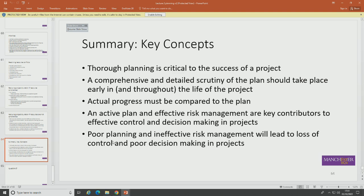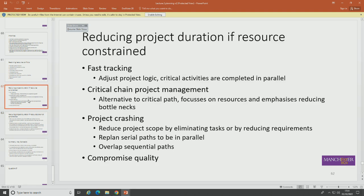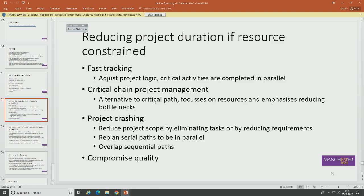So the critical chain is part of the slides at the end, which is here. What I did there was just explain that in a bit more detail. I would say though that I would not expect you to apply critical chain, only describe what it does. If you understand that the reason we have it is because some resources are not available because they're on other projects, and that to mitigate that you've got this thing called critical chain, it puts buffers before and after where the critical resources are to guard against delay because of external availability problems. That would be about it. Okay. So you'll be releasing your set of class slides? Yes. Okay, thank you so much. Thank you.